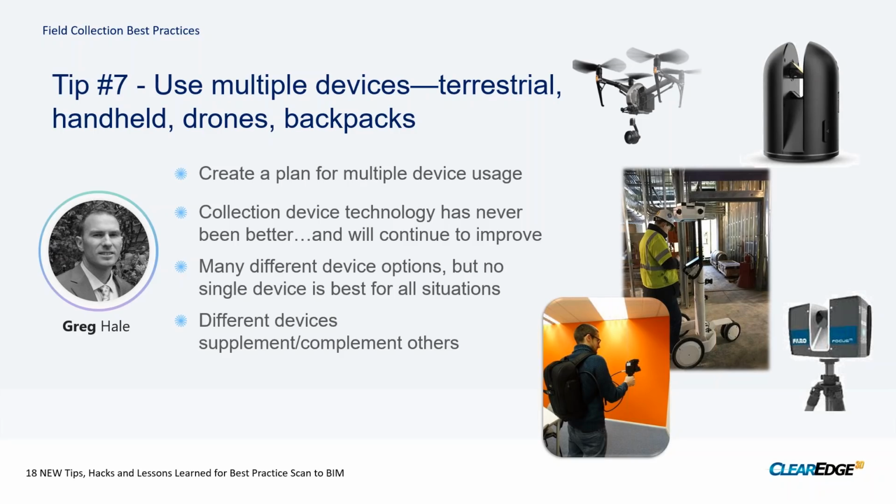One of the things I love is the mobile scanning. A great example I have is occupied buildings, especially things like apartments or classrooms. They're actually occupied, and people want you to scan or document while they're being occupied. So your main goal in a lot of those cases is to get in and out as fast as possible. So some devices won't be able to get you there, so you might have to alter your plan to do that. So lots of options.